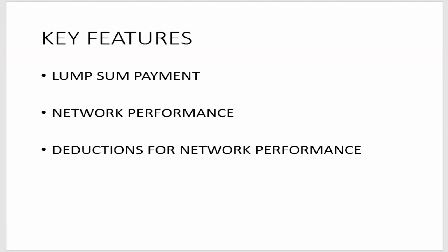He's measured for network performance. Let me at this stage give the network performance for paved road sessions. The contract provides for two network performance indicators, for paved and unpaved. What we are doing at Upper West and the Tamale area is mainly unpaved. For the paved sessions, he needs to maintain a level of service which is very good. The level of service must be very good. We are interested in the maximum rut depth and the deflection.